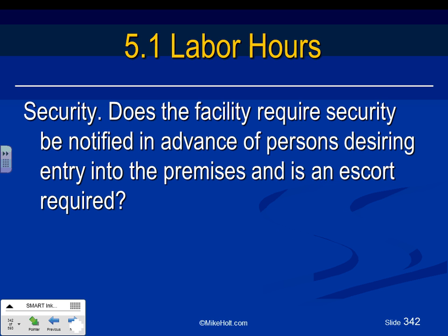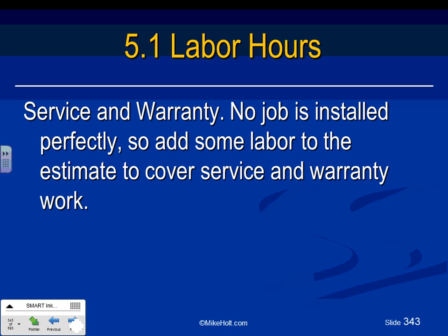Security. Does the facility have security? Do you have to notify the security people every time you get in and out? That will take too much time when you're being escorted to your work. Does that make sense? Am I going too fast on these? They're common sense. I'm going to go into more stuff, more good stuff.